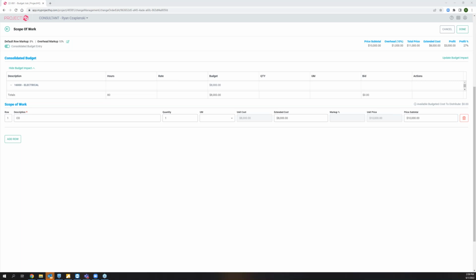The problem is that if you haven't received the formal change order for the work, you've been given written direction to proceed. That's always a tough one. I know that happens everywhere, but shouldn't you not start the work until the change order has been approved? You know, there's definitely some give and take there. Right. It would not come up on the financial reports in Executive HQ or in Foundation until the change order is pushed into Foundation.